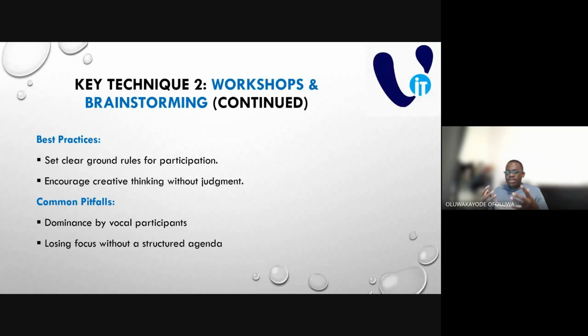What are the common pitfalls? I've mentioned some of it already. Dominance by vocal participants. There are some people that just like talking and they want everybody to listen to whatever they want to say. So when another person is talking, they want to jump in, and that's why you have to put your ground rules. Oh, please raise your hand when you want to talk, so that everyone can have an equal voice.